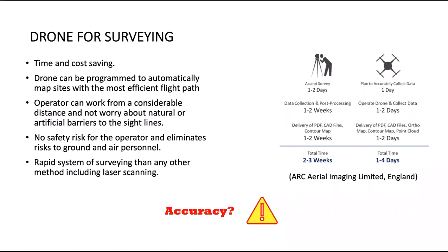So it removes these types of risk to ground and air personnel, and of course it is more rapid. If we look at traditional surveying, the survey takes 1 to 2 days, then the data collection and processing take 1 to 2 weeks, and the delivery of the PDF and the CAD file will take another 1 to 2 weeks.